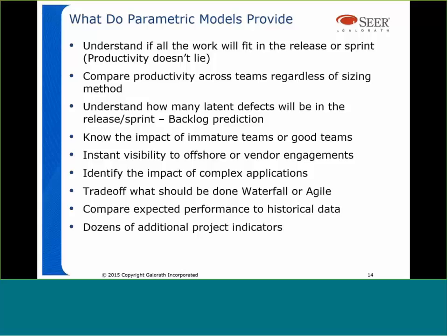And again, our goal with the parametric model, obviously, is you want to be capturing historical data so you can feed it back into the model. Once you have this historical data, you can compare your expected performance to how you performed last time. So you let the math be the truth detector, and you remove the human bias of optimism, and you let the model say, no, you're not going to perform as good as you did, because historically you haven't been performing that well. And it's very easy to drop these back into the model.